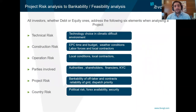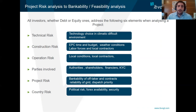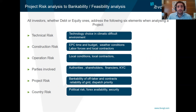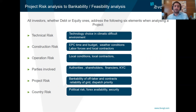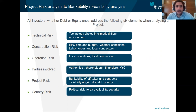For investors, whether on the debt or the equity side, we follow six main elements in our risk analysis. We look into the technical risk — for example, if we are developing in a different climate or environment, what is our technology choice in those climates. We look into the construction risk of the plant itself, including the EPC time and budget, the weather conditions, and the labor force. We also look into operation risk and choosing the right local contractors.